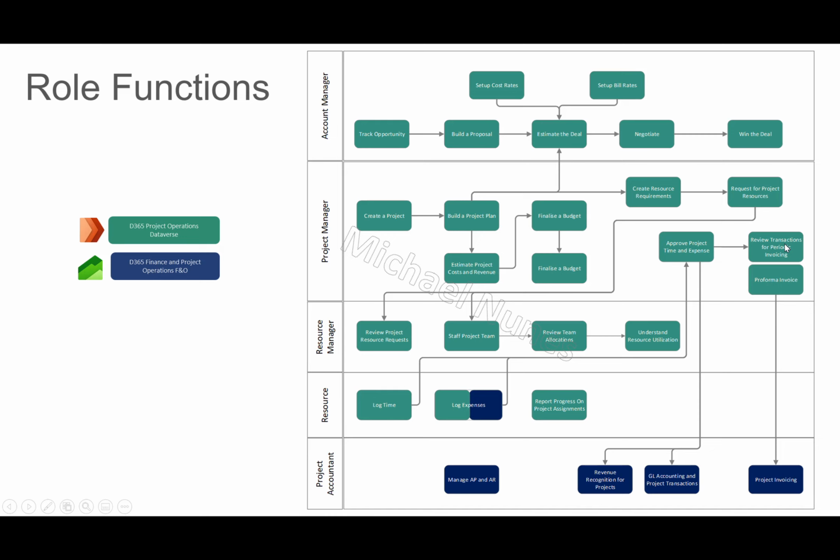They can then review transactions that they wish to process and post on a periodic basis, each day, each week, each month, and they mark those transactions to be invoiced. They raise a pro forma invoice using the sales module within D365 Project Operations Dataverse. That pro forma invoice will then integrate into finance and operations. The project accountant or the finance team, accounts receivables, can then manage accounts payables and accounts receivables records, chase payments, look after credit limits, etc.